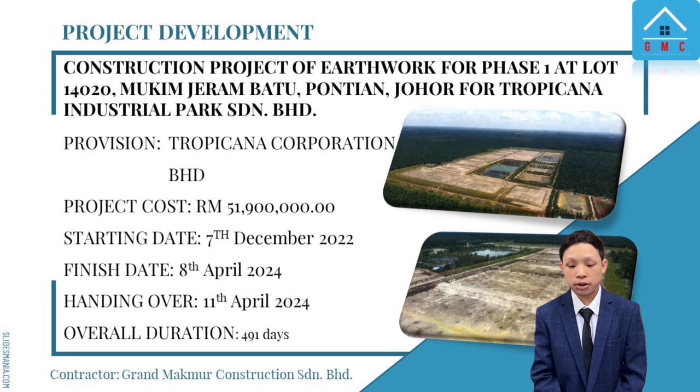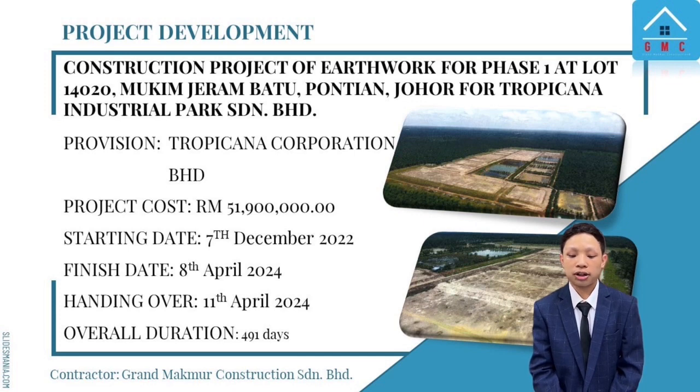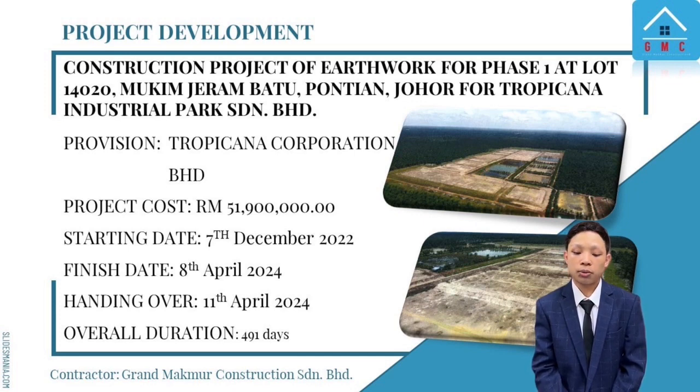This construction project of earthwork for Phase 1 at Lot 14020, Mukim Jiran Batu, Pontian, Johor, for Tropicana Industrial Park, Sdn Bhd, will be placed under the provision of Tropicana Corporation Bhd. The cost for this construction project is 51,900,000 Malaysian Ringgit. This project will be started on 7 December 2022 and it will be completed by 8 April 2024. Lastly, the site will be handed over to Tropicana Corporation Bhd on 11 April 2024.